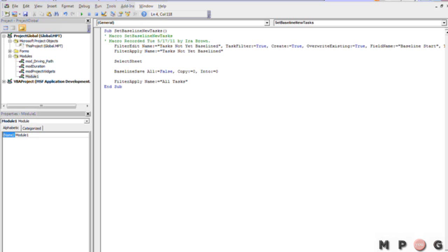So what I like to do, especially when you're working in a standalone copy of Microsoft Project, is we can actually create the filter as part of the automation. And the amount of time it adds to run the code is in nanoseconds. So this way you're ensuring that those particular things that you're relying on being there when you run your macro are there. Now, if you're running in a Project Server environment and you can create enterprise filters or enterprise tables and views, then users really can't delete those. So in that case, you probably would be okay just applying that rather than creating it as part of the macro. Okay? So I hope that answered your question there.